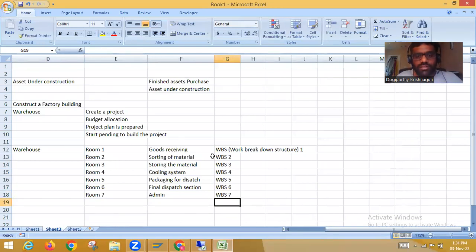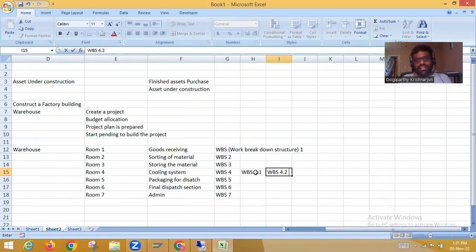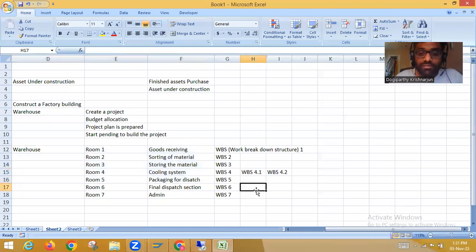So within these work breakdown structures, we also have an option to create subsections as well. Like for example, to build a cooling system, if a cooling system is considered as a work breakdown structure, they can further break this down as work breakdown structure 4.1, which can be used for installing the compressors for the cooling system, and a work breakdown structure 4.2, which could be for setting up all the cooling control mechanism, something of such sort. So anything that the company wanted to define. So all these sub elements of a warehouse can be categorized into various work breakdown structures,